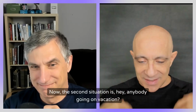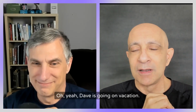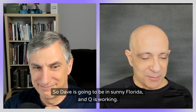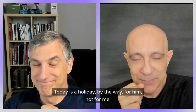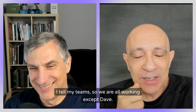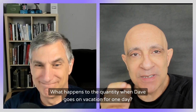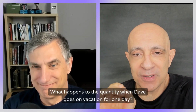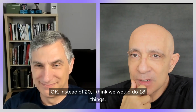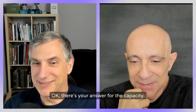Now, the second situation is, hey, anybody going on vacation? Oh, yeah, Dave is going on vacation. Q is going to work. So Dave is going to be in sunny Florida and Q is working. Today's a holiday, by the way, for him, not for me. So I tell my teams, we are all working except Dave. What happens to the quantity when Dave goes on vacation for one day? "Oh, Q, instead of 20, I think we would do 18 things." Okay, there's your answer for the capacity. Run with that. That's it.